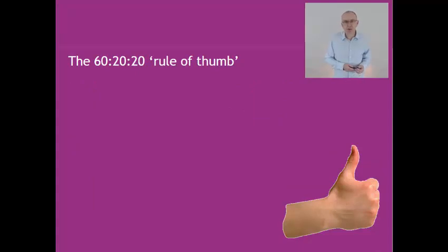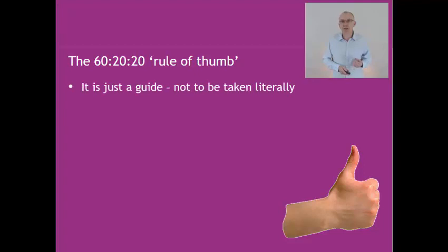One rule that's often used a lot in MoSCoW, and it causes a lot of confusion to be honest, is the 60-20-20 rule. But importantly, it's a rule of thumb. It is just a guideline. It's not a fact. If you're prioritising and you find you have 50% of your work is must-have, don't try and increase it to 60. Just go with what you got. It's a nice guideline though, and if you could load a time box this way, it's slightly idealistic, slightly theoretical, but if you can load a time box this way, you're giving yourself a lot of room for manoeuvre here.